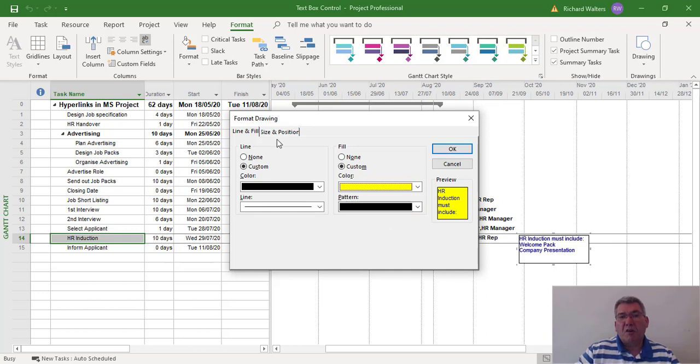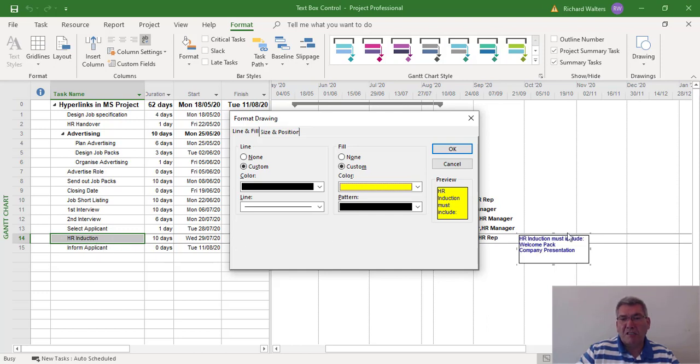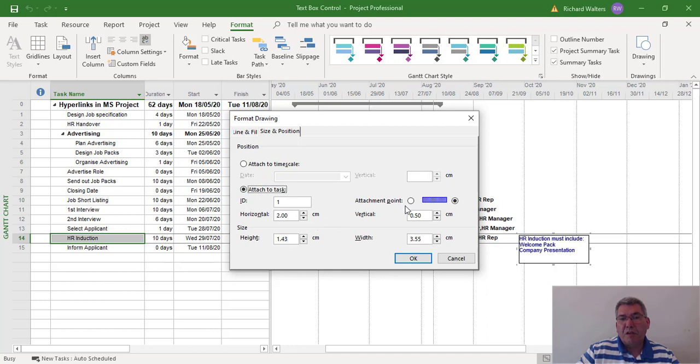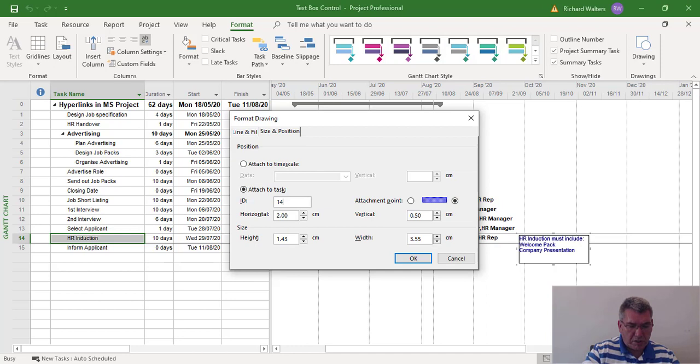Now you can also link it. Because if the tasks move around, say this task was constrained and we move it on a bit, you want the task box to go with the task if it moves. So I want to go to size and position and I want to attach it. You can go front point or back point. I'll go to the back point. And I want to attach it to task 14, which is the HR induction.